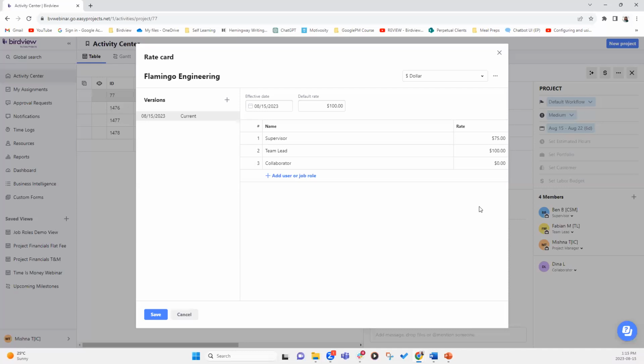Their labor hours or billing rate is not going to be calculated. So that's what you're indicating. So it's very important, if you have a role or a resource assigned to a rate card, they must have a dollar value. If there isn't one, make sure you delete them. Otherwise, the system is not going to calculate the billing labor correctly.